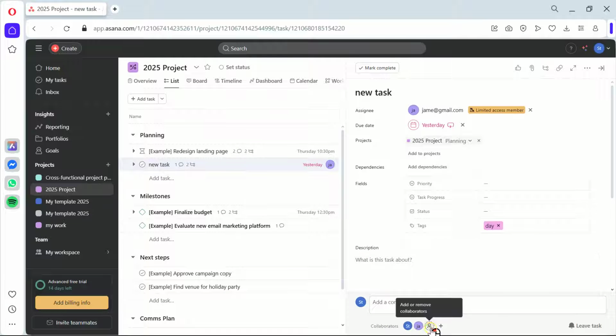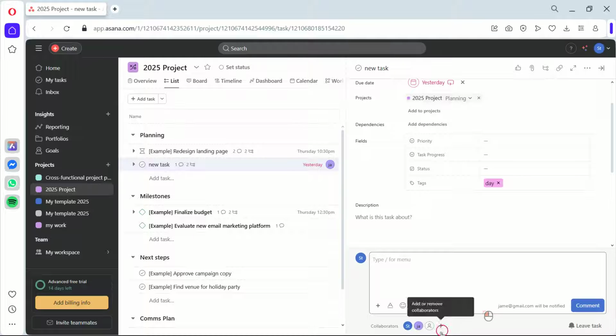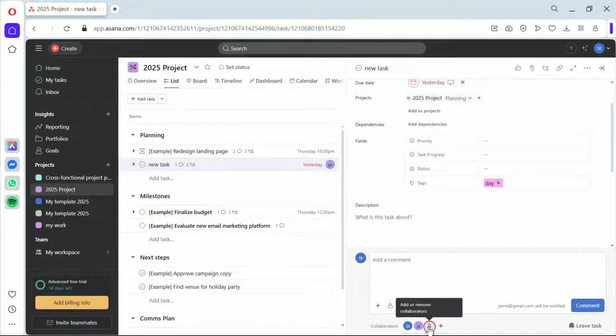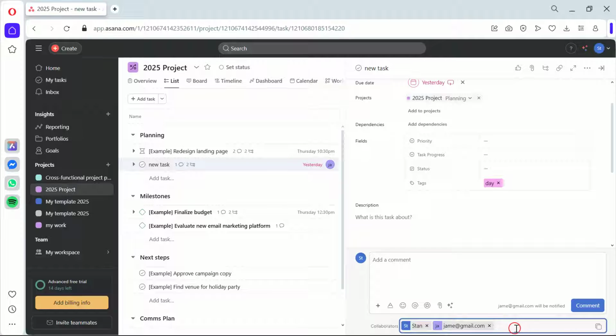Let me explain why these alternatives are better than multiple assignees. When you assign multiple people to a task, there's a risk of the "everyone's problem is no one's problem" syndrome. By splitting the task or using collaborators, you ensure clear responsibility and accountability.